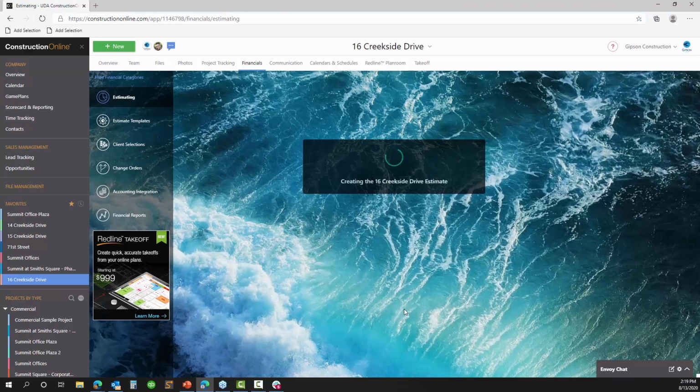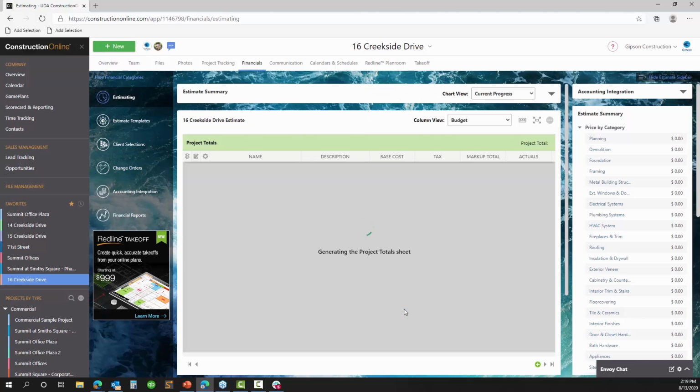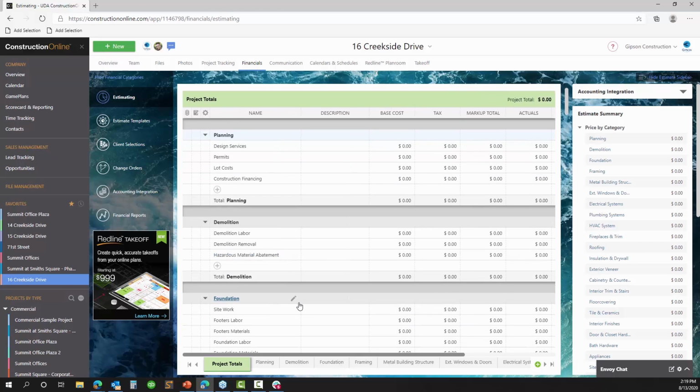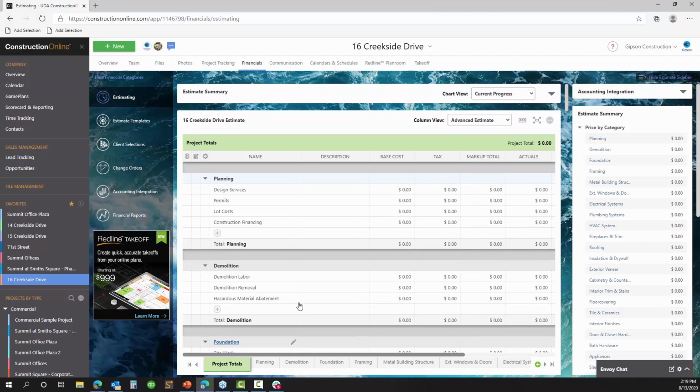That's right. Now, a couple of key points to take away from the estimate template system here is that you can build out a very robust estimate template and then modify or adapt that template into other templates for different types of work. I think a really common example would be the master estimate template for a major remodeling project that then is cut down in some cases for just bathroom work or just kitchen work.